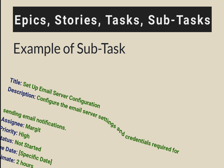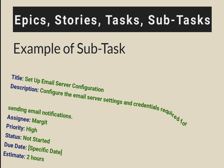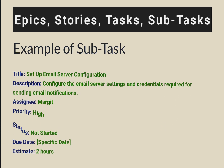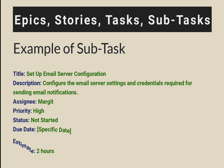A subtask example could be: set up email server configuration. Description: configure the email server settings and credentials required for sending email notifications. Assignee: Mark. Priority: high. Status: not started. Due date: a specific date. Estimate: 2 hours.